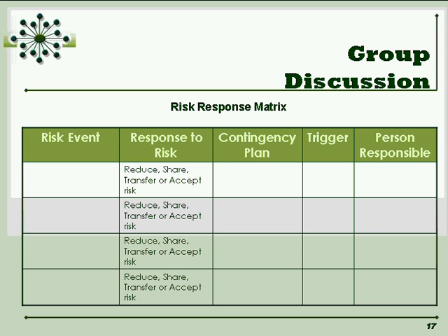And if we do this in a formalized way and are able to present our contingency plans to the sponsor, I think we have a much better chance of them funding that sort of plan. Whereas if we just say, well, we're worried about this, but if we've actually gone through the mechanics of doing this whole process and can show this is why we're worried, this is what happened in the past, this is the way it sort of came out on our risk severity matrix, that may increase the likelihood that a sponsor will be willing to pay for that and see the value in investing money in that contingency plan.